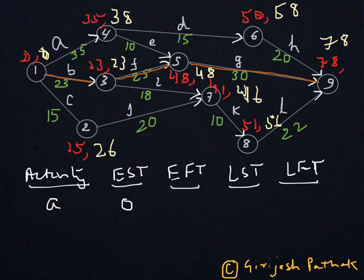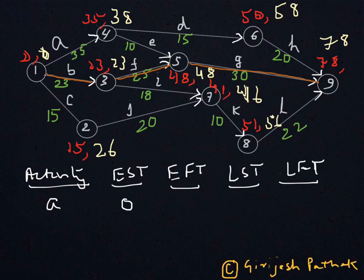Then the Earliest Finish Time: if you start the activity at time 0 and activity A requires 35 days, then 0 plus 35 means the earliest you can finish this activity is after 35 days. So the Earliest Finish Time for activity A is 35.